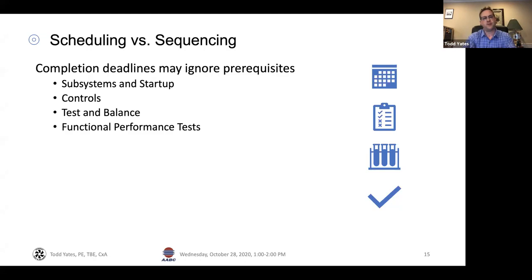I'm sure it'll work fine when they do that. So our work is actually a prerequisite for some of the commissioning work, and you can see how these things are stair-stepped on one another. By being involved early, by being part of the construction team, rather than just somebody that has to come at the end and create a report for us, we get to talk about these issues and actually get them in the schedule.